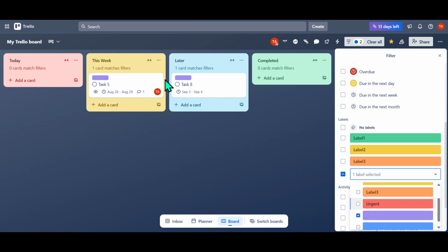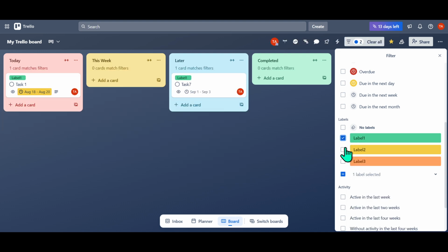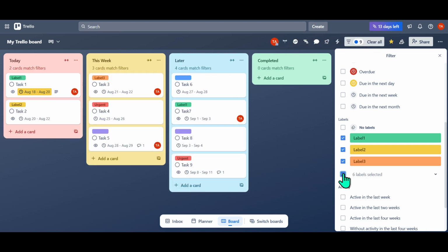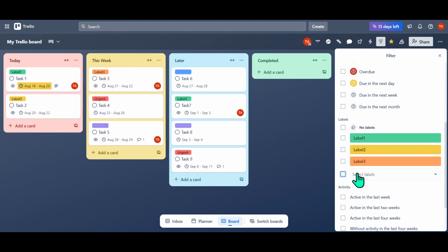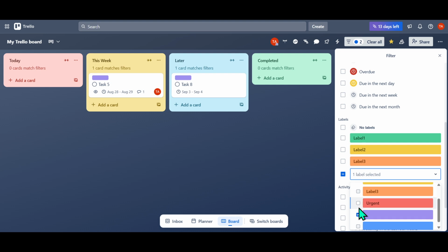If you're managing multiple projects or teams, you might find yourself using various labels. A good tip here is that you can actually filter in multiple labels at once. By doing this, you can, say, view all cards labeled urgent and in progress together. This functionality lets you see intersections across different segments of your workflow, lending clarity to your immediate priorities.